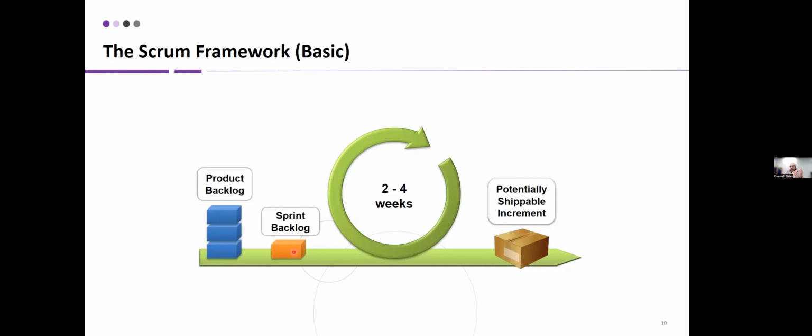Just to mention something that I mentioned before, the planning. Traditionally, we would plan maybe for 3 months for a 1 year project, and then we start working. Here, we try to truncate it by, say, half of this or less. So let's say 3 weeks or a month. But then a lot of planning happens throughout the whole project. So this is kind of the genius of Scrum, that it's saying we're not really doing less planning. There's a lot of planning still involved, but the upfront planning is less, and then you're basically pushing a lot of that planning as you're building. You're planning and building, planning and building. So that's the cyclical nature.